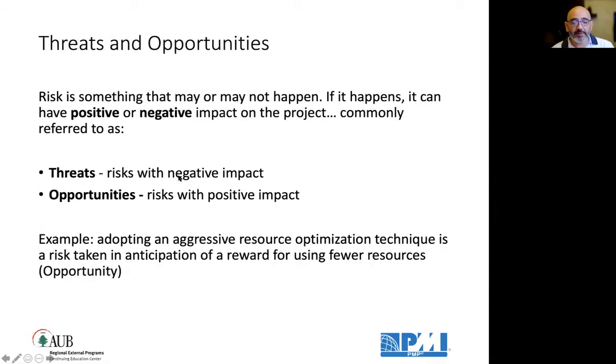But there are threats, the risks with negative impact, and opportunities, the risks with positive impact. For example, adopting an aggressive resource optimization technique is a risk taken in anticipation of a reward of using fewer resources, thus improving the budget variance. So it's an opportunity.